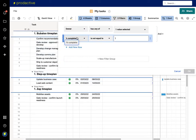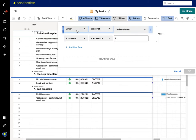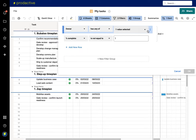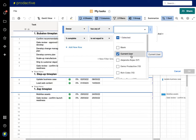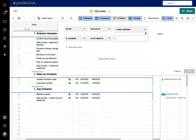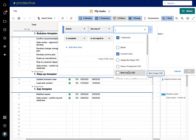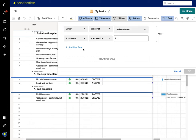The reason it disappeared is that on the filters I'm asking it to only show me items which are not complete. So you don't have too cluttered a list with stuff you've already done. The key point here is you have the owner field. For it to come through the filter, it is filtering on 'current user.' For this to work it needs to be a contact list column. What it's doing is looking at who's logged in — in this case I'm logged in as Demo Productive, so it will show me all those tasks. If I was logged in as Rich Coles, the view would show tasks assigned to Rich Coles. This means you don't have to have different filters set up for different people — they go in and see their own ones.